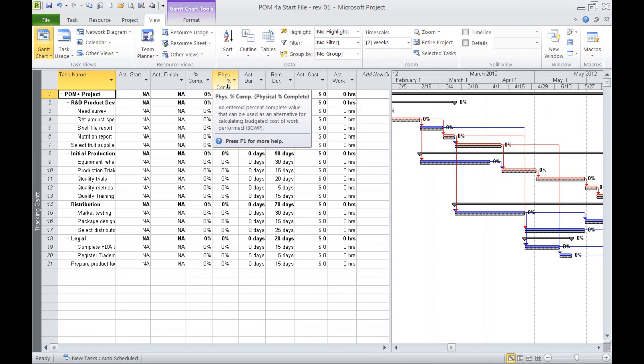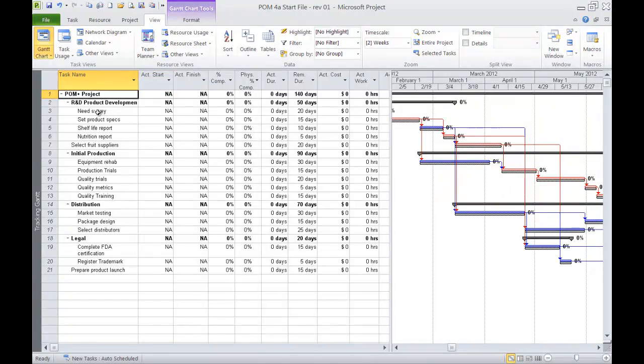is a different way to track your project, where we're going to be tracking percentage completion by discussing, if you will, time passage on each of these activities. We're going to basically do it in a more subjective setting where we discuss with the task owners, hey, how far are you? They'll say, I'm 25% done, I'm 75% done, or we can relate it to time. That's what the percent complete column is all about.